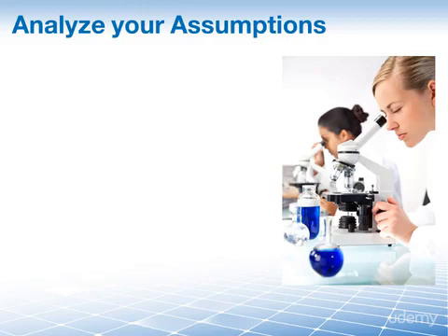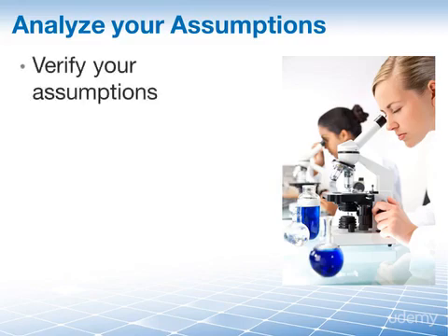As you remember, we have a bunch of documents that we use as inputs. Many of them are based on certain assumptions. The project management plan has many assumptions stated, as do other plans, estimates, schedules, and so on. An excellent way to identify risk is to question and analyze those assumptions. Are they still valid? Has something changed? Did your schedule change? Is your estimate based on resources that are no longer available?